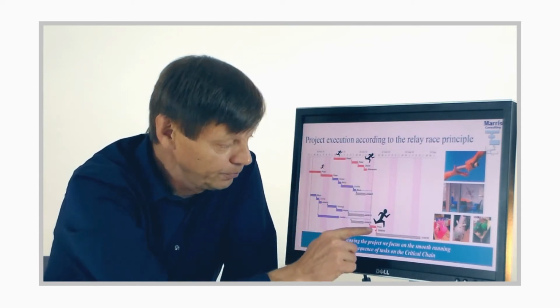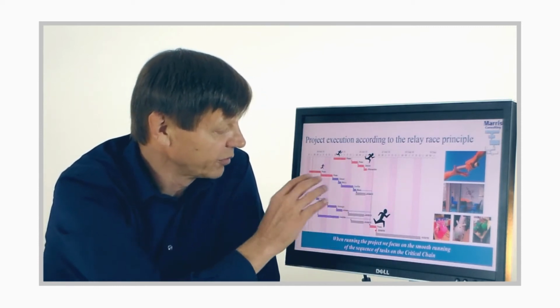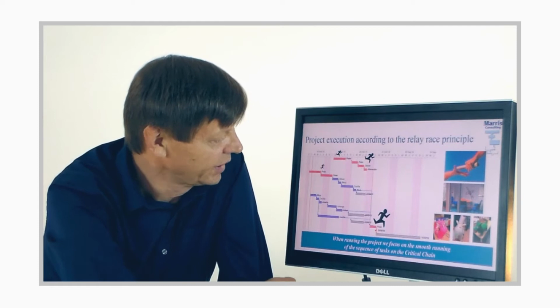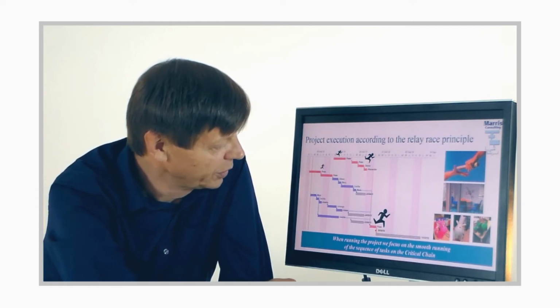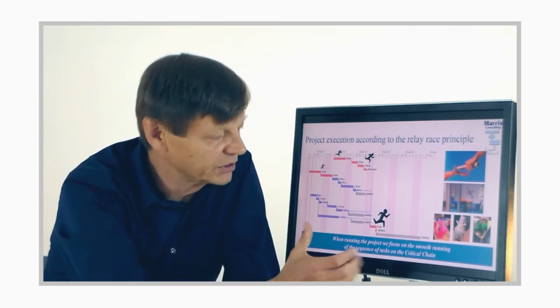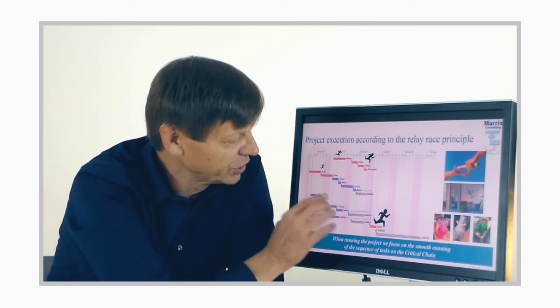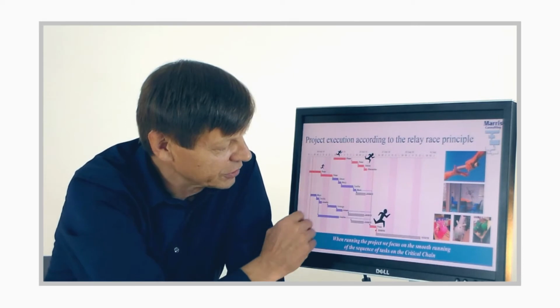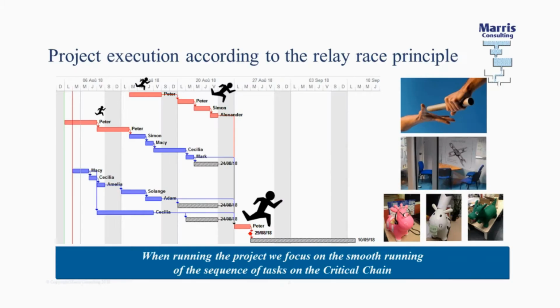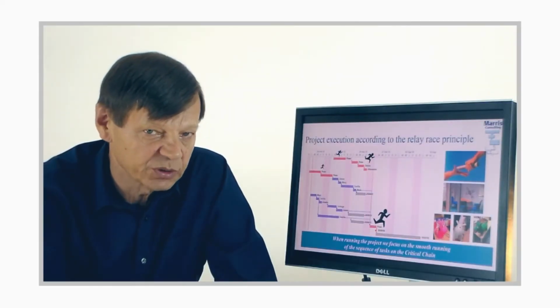It is in red. Therefore the other resources and the other tasks are in blue, and we've added buffers. This is the project buffer down here, and these are the feeding buffers that ensure that the non-critical stuff doesn't impact the critical chain.